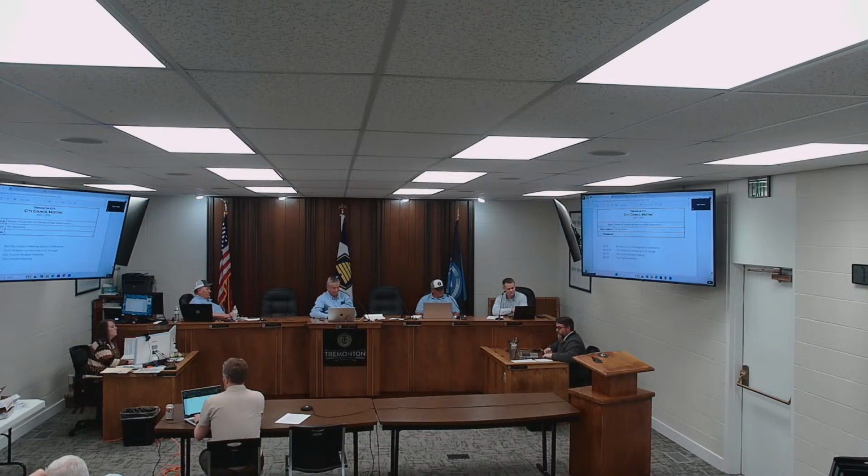As per the council's request, we've asked him to put a budget number to it. It's going to be very loose and probably quite a bit higher than the bids would come in at, so don't put a whole lot of stock in it. Keep in mind that he's going to pad the numbers, because if you want numbers at this stage of the game, that's what we're looking at.